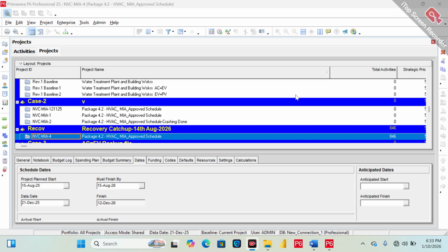Lots of planning engineers think that our performance is greater than the planned percent, but again the client is asking for a catch-up or recovery plan, so they blame the client or consultants or whatever the reporting agency is. Actually they are correct, because if you are not following the critical path, your progress will obviously be higher than the planned percent at any specific cutoff date, but you will face delays on the critical path. This is the main theme. So we prepare the revise recovery catch-up plan.